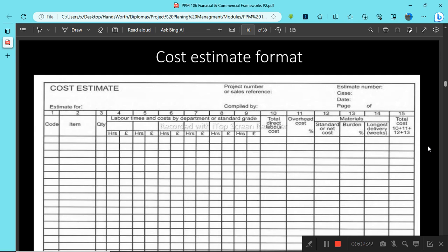We said the weakness of this approach is that it does not really take into account the details of the small components or activities that will be involved in implementing our given project. Therefore, it is known as the top-down approach because it considers the aggregate component of the project when it comes to estimation of the project cost.